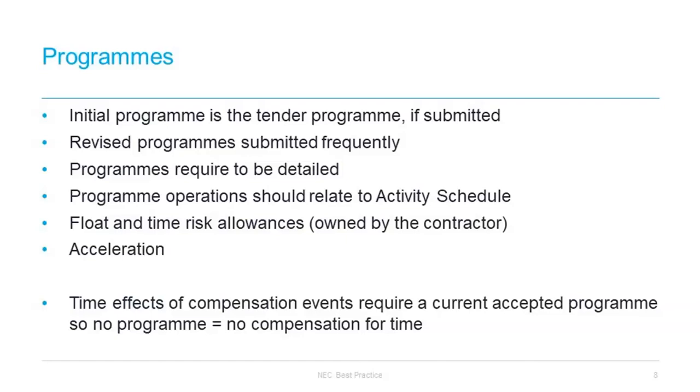It is certainly different to what NEC unamended envisages acceleration to be, and can just be turned into a compensation event. So that's in circumstances where the acceleration provisions are amended such that the contractor has to provide a quotation, or even such that it has to simply accelerate when told to, and will get compensated for it.